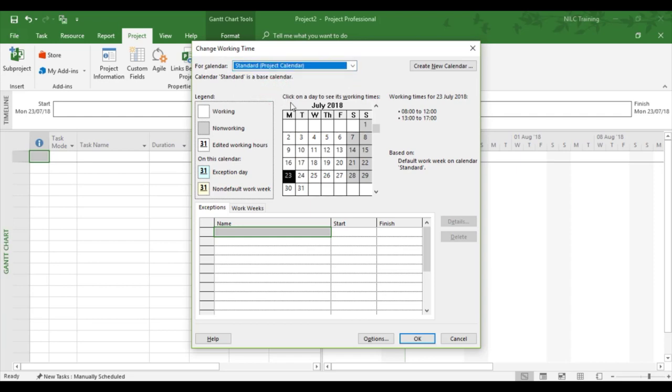That's set to work an eight-hour working day between 8 and 12 and 1 and 5. So in effect it's taking off an hour's lunch, so that's the calculation project is setting itself, eight hours in the working day.